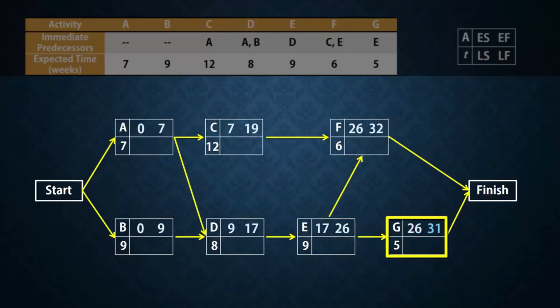Note that although G is the last letter, it doesn't have the highest earliest finish time because F has 32. So we say that the project's completion time is 32 weeks. In essence, the project's completion time is the highest of the earliest finish times at the finish node.